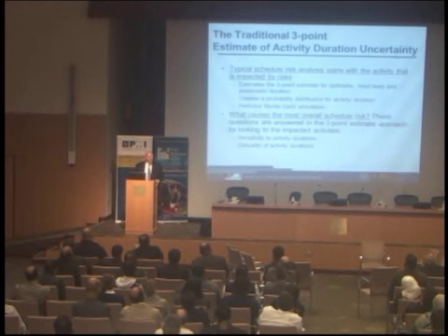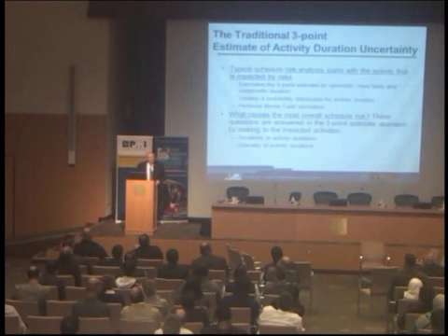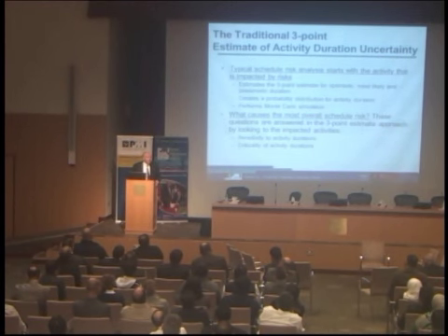But when you put the three-point estimate on the activities one by one, you can't do that. Partly because you don't know which of the two or three risks you were thinking of actually was most important. Oh, and by the way, the three-point estimate is really an estimate of impact, not an estimate of probability.